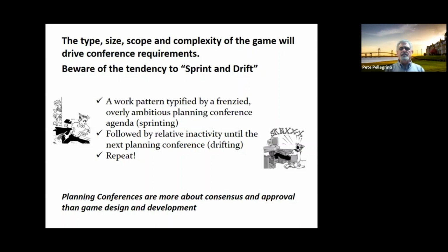All right, but it's this idea that the planning conferences are where all the work happens. And in between planning conferences, people don't do anything. So you had this frenzied activity for a day or two, trying to grind through stuff that's part of your initial, mid, or final planning conference. And then nothing happens until the next one, except for a small team of folks who try to beaver along. So this sprint and drift pattern, we don't find to be terribly productive.